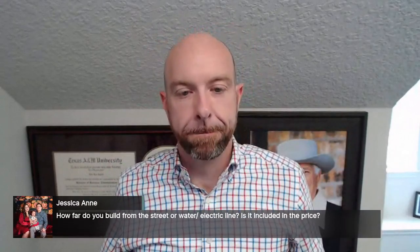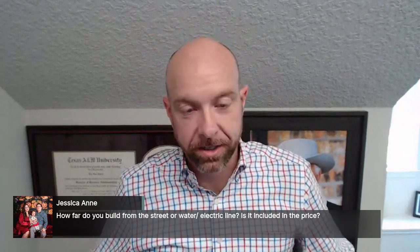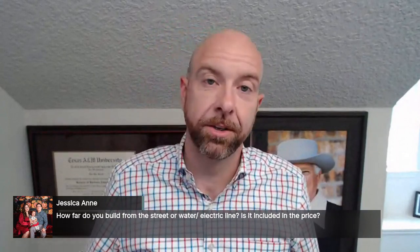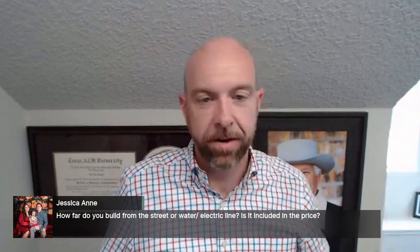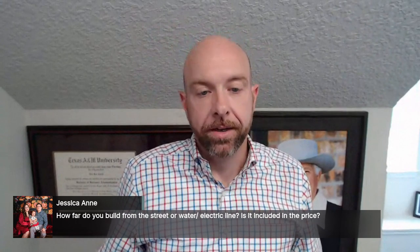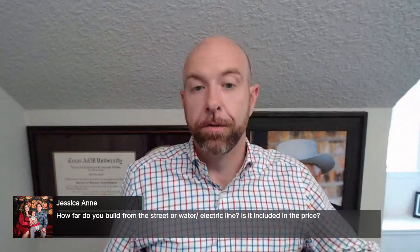Jessica is asking how far we can build from the street and/or water electric line and what's included in the price. All right, Jessica. So I sold a home when I was selling homes at our location in Spring, Texas. We built a house in the middle of 26,000 acres in Shepherd, Texas. So it can be miles from the street, or it can be 25 feet off the road. On average, we're probably 50 to 125 feet off of the roads where we're building on an acre or two. What's typically included in our price is 50 feet of electrical and water line. And then we have a price per lineal foot to go beyond that.